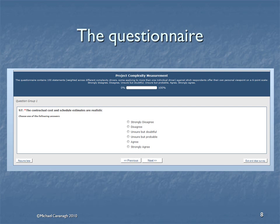The way we assess this is by using an online questionnaire — a hundred questions. This questionnaire is issued to every team member, or even better, every stakeholder, who are asked to complete these questions. All of which relate to the various drivers we talked about before: the competency drivers and the project-specific drivers. Responses are collected online via a secure process and then analysed in a number of different ways.